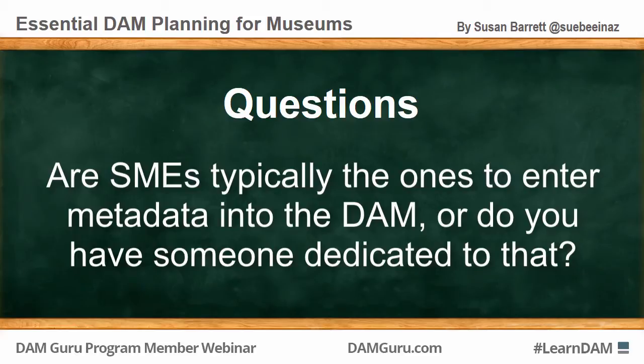And that would also be something that you would want to manage when you do your RFP, understanding that the vendor would have to help you with the technical side of metadata management. But the decisions about what the metadata should be and what elements are required for every single item that goes into the digital asset system really does belong with your subject matter experts, because they know the collections and they know the materials in a way that no one else can.